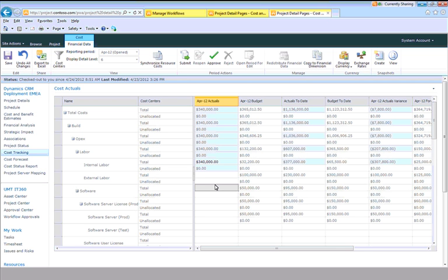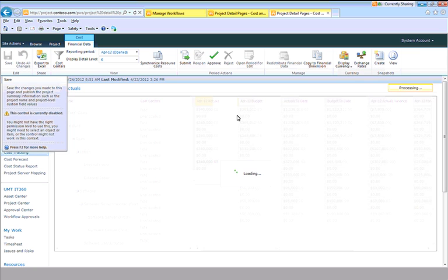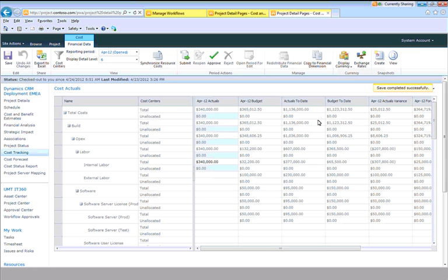I manually enter the information. That's one way. Another way is to use the data import module that we have to pull in the actuals for the current period from an ERP system so it will be automatically displayed. Once you've entered the actuals here, you'll see we dynamically create the different variances based off the data that we maintain, the budget, actuals, and the forecast.